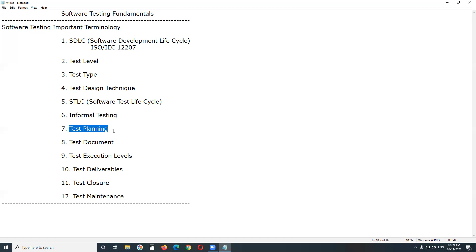Test Planning is a phase in STLC — Software Testing Life Cycle. The main objective of this phase is to prepare a test plan document, which is a roadmap for the software testing process. It includes three major aspects: scope of deliverables, effort estimation, and resource plan.